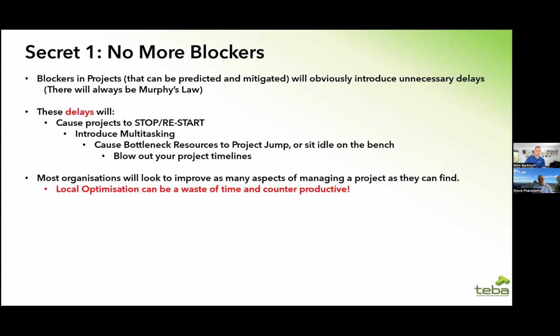And the thing you need to focus on is optimizing what we call the bottleneck. In the context of today, we're optimizing the bottleneck resources. It's no good improving how well someone else does something until you've improved the way your bottleneck resources do things.